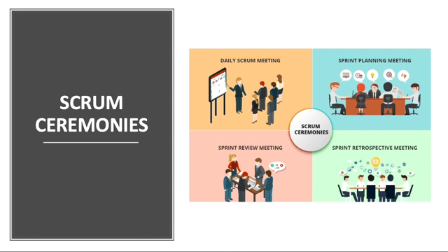Additionally, we have the sprint planning meeting. This is where the product owner defines the objective of the sprint. We take the highest priority elements from the product backlog, and then they are converted to sprint tasks. This is where the development team determines the elements that it commits to implement in the sprint.